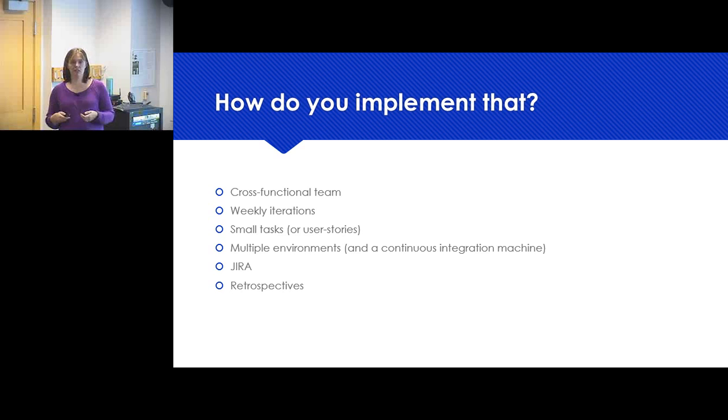So every week Becky lays out the things that she wants us to work on this week. And we, as developers who are actually going to do the cards, give estimates on those things. We say, yeah, I think that's going to take me 8 hours. So we put that in the sprint. I think that's going to take me 2 days.